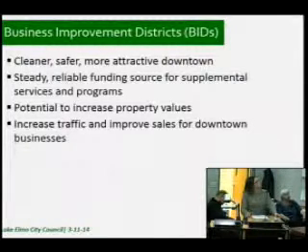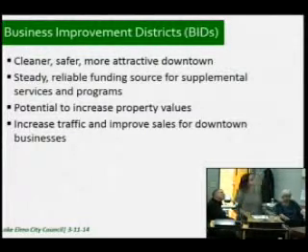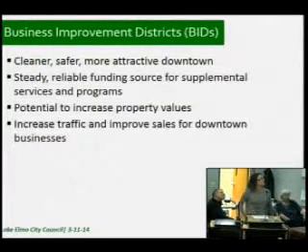To get a business improvement district established, you would start with selecting the steering committee. You'd probably go out then and do a needs assessment and get a database of the entire property addresses within the district. Do the needs assessment, and off of that, create a plan, and then you do public meetings and get it through legislation.